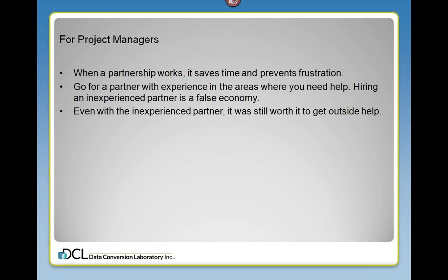lesson is go for a partner with experience in the areas where you need help. Hiring an inexperienced partner is a false economy. The partner, partner number 2, had an excellent reputation in one area, but they had no experience in the other areas, so they were really over their heads, and that's why the conversion script and the publication scripts were so subpar, shall we say.